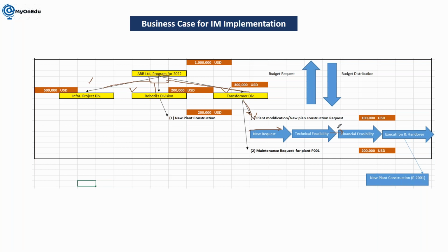So once it is done here, then it will go for final approval. Once it is done, then we can transfer this particular appropriation request to project execution. That is one part. So the same request we can roll up these values here as plan values, and further we can distribute this value to your project as a budget.